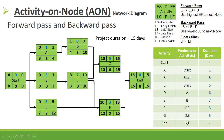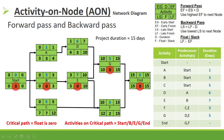Our project duration is 15 days. The critical path is where the float is 0: Start → B → E → G → End, and also through F. This is the same critical path calculated in part 1 using the Activity on Arrow method.